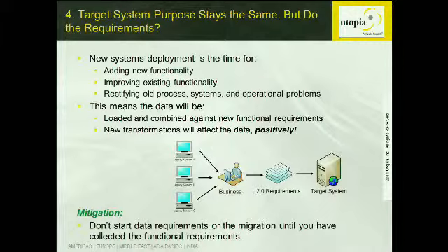So the next one here, target purpose stays the same, all right? We don't need to worry about functional requirements. Well, that's just lovely, but every time we do a systems migration or an application migration, it opens up the opportunity to add new functionality, improve the existing functionality, rectifying old system problems and performance issues. So the mitigation here is, don't start your data requirements process until you've outlined your functional requirements, because the functional requirements will certainly provide demand on your data.